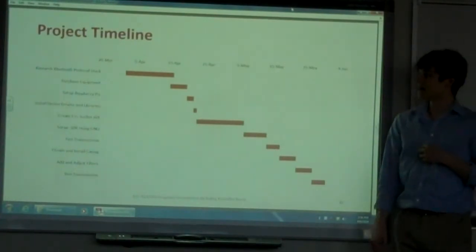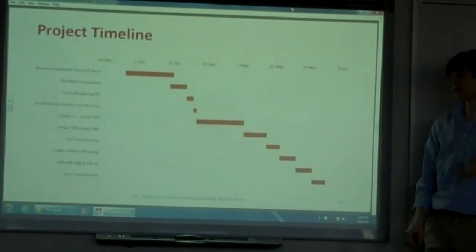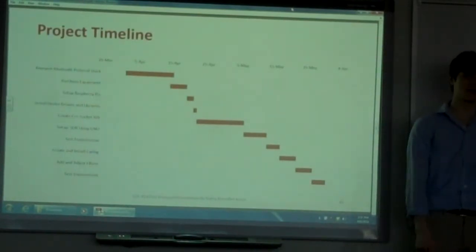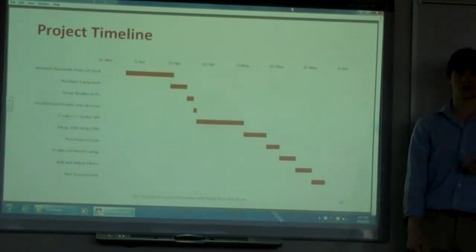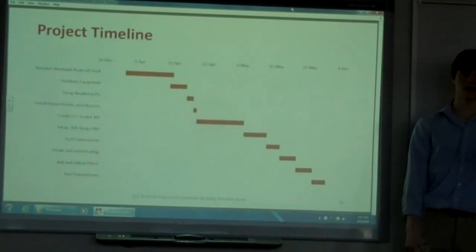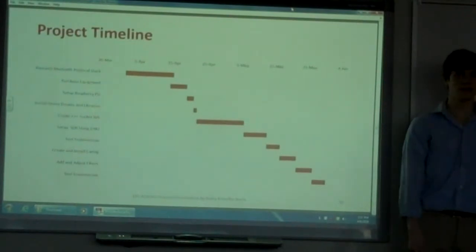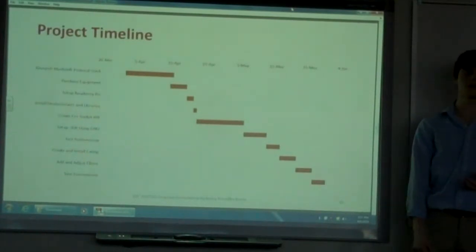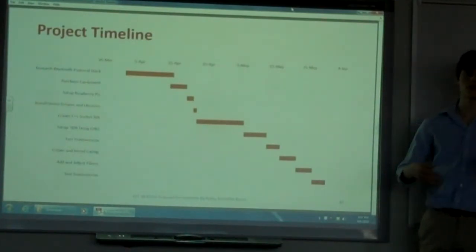For my project timeline, the biggest section is researching the Bluetooth protocol stack, which does take a while to understand — I found some good resources online for that. I also spent a lot of time creating the C++ socket API. Actually testing the transmission, audio modules, and adding and adjusting filters takes up a lot of time, because testing wireless transmissions — whether Bluetooth, FM, or any type of radio wave — is really hard to test and takes a lot of time to get just right, to make sure it's not going to fail after maybe 10 uses or 10 minutes while running. This audio system's reliability is very important, because you want it to always work.